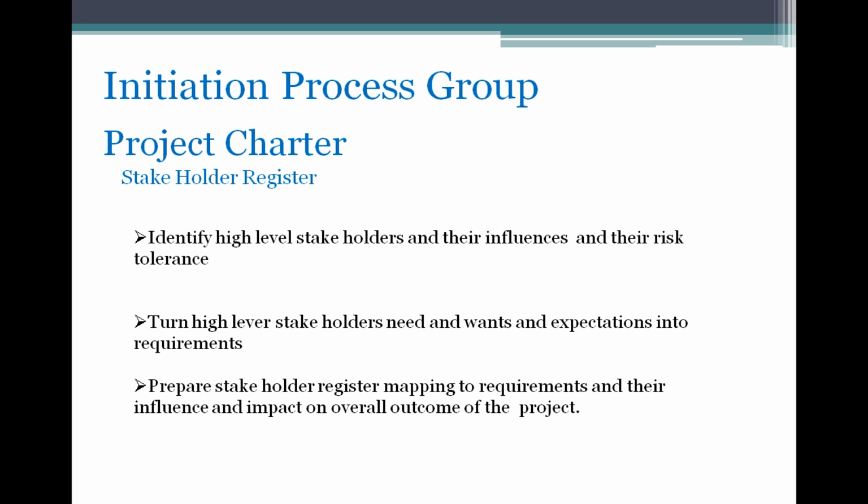So we prepare the stakeholder register, mapping stakeholders to requirements. Who has high influence on which requirement, and who is responsible for that requirement? During project execution, throughout the project, who should be communicated with when there is an issue or conflict on the requirements?